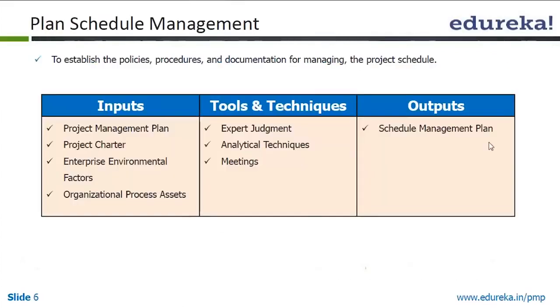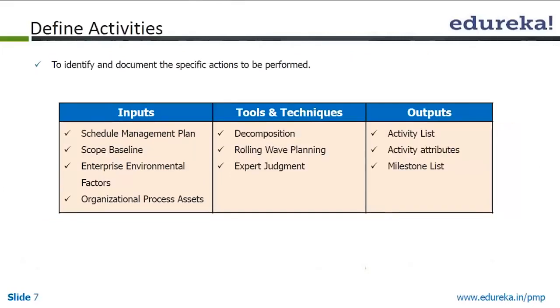As usual, the first process within a process group or within a knowledge area is to plan that process management. So we have to plan the schedule management. And what are the inputs to planning of schedule management? Project management plan, charter, EEF and OPA. The objective is to establish the policy, procedure and documentation for managing the project schedule. Tools and techniques are expert judgment, analytical techniques and meetings. And what we get out of this, the output, is the schedule management plan.